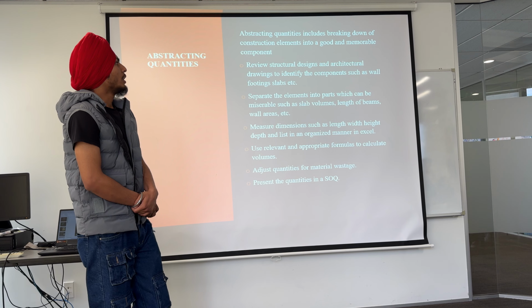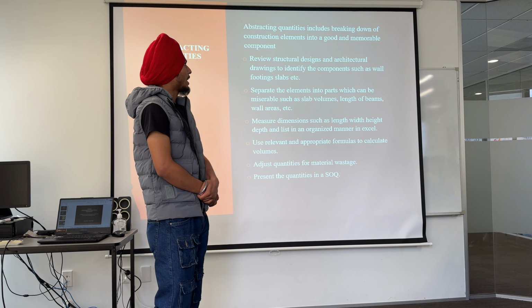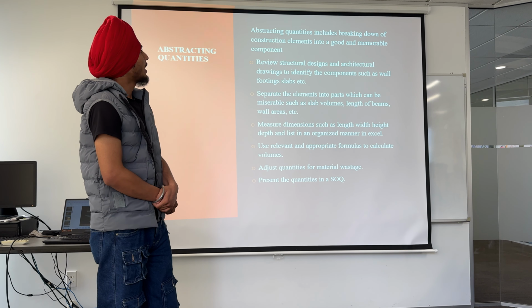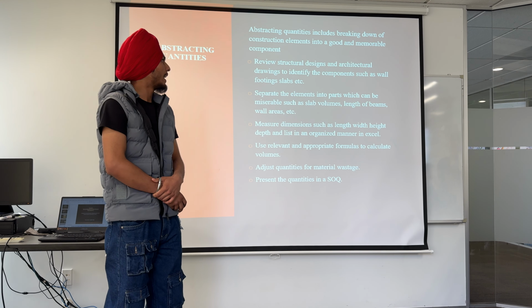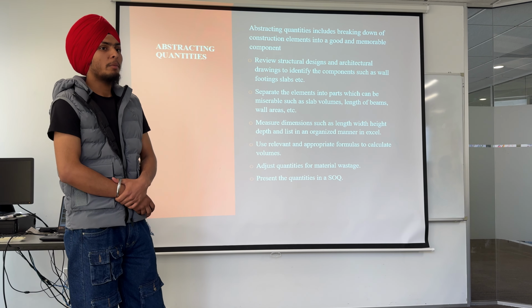The next slide is abstracting quantities. Abstracting quantities includes breaking down construction elements into smaller, manageable components. It reviews structural design and architectural drawings to identify components such as footings, slabs, etc.